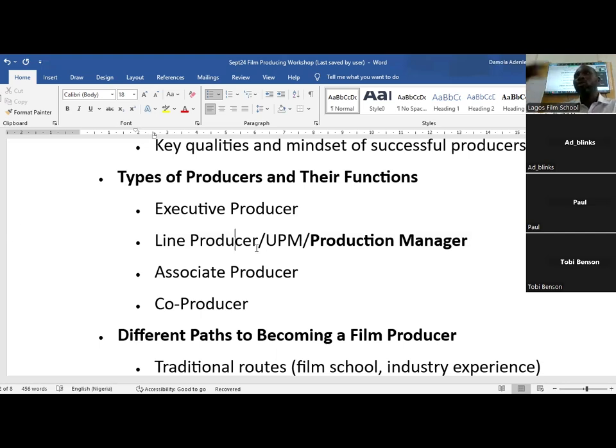To put it in another way, to paint another picture, let's come back home. Producer, what are the two most important things I said the producer does? Budgeting and scheduling. Good. The producer has set budgets: this is how much we're spending for this scene, this is all the things we can get. The producer has set a schedule. We'll be on this set for 1.5 hours. We're shooting at an eatery. The eatery has asked us to come on Sunday morning when most people will be in church, 7 to 8:30 a.m. At 8:30, we must leave this place.